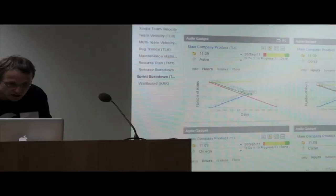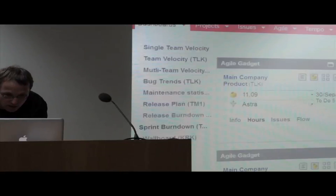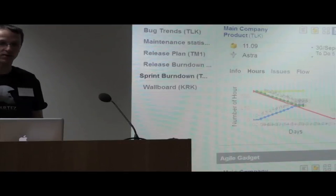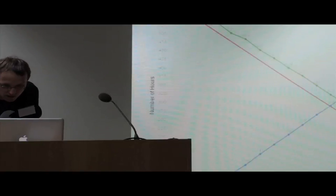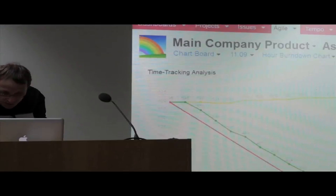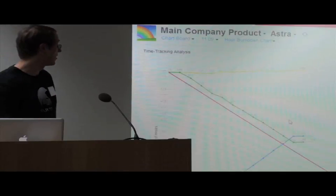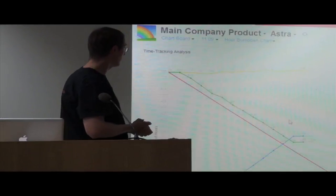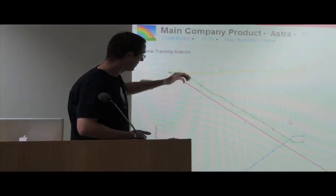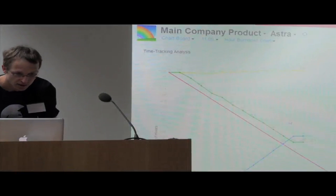So it's definitely people working on some stuff. Let me try to make it a little bigger, unfortunately JIRA is not the best view. I will click on that here, and you can see that we have standard reporting for a standard burn down chart, with days here and how well or how bad we are doing regarding our optimum, or planned progress, which is this diagonal line. And this is for every team in the company.